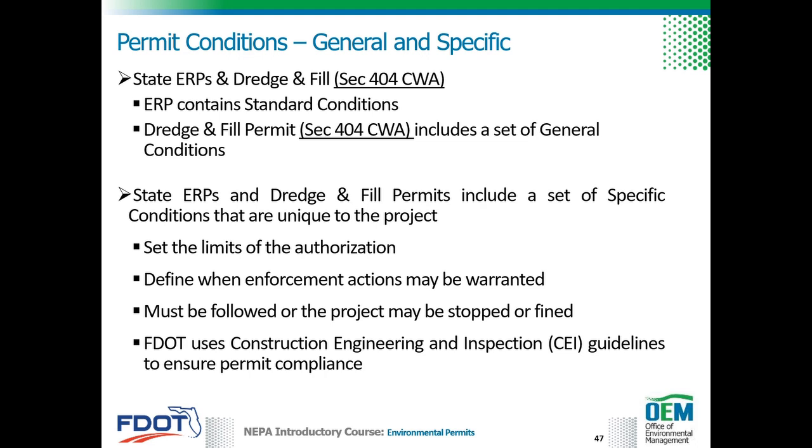The State of Florida ERP general conditions are taken from Rule 62-330.405, whereas Dredge and Fill general conditions are taken from 33 CFR sections 320 through 330. All the standard and general conditions are binding to FDOT and enforceable under the regulations of the governing authority.